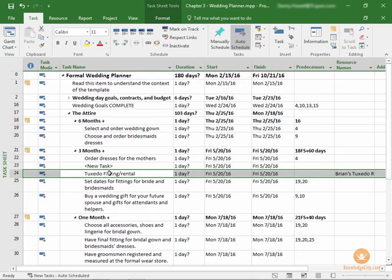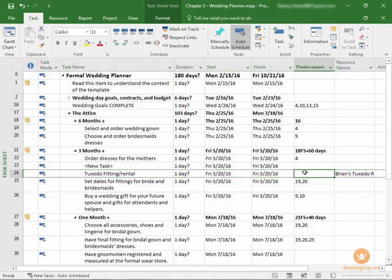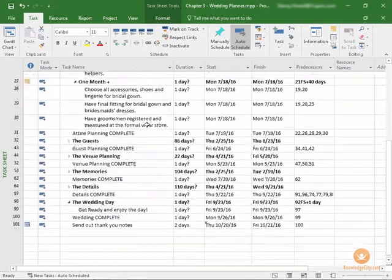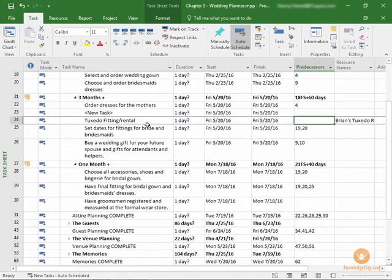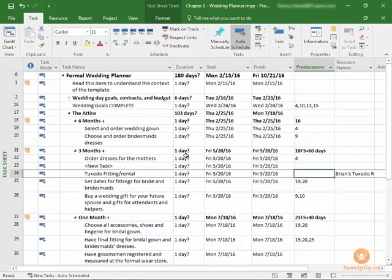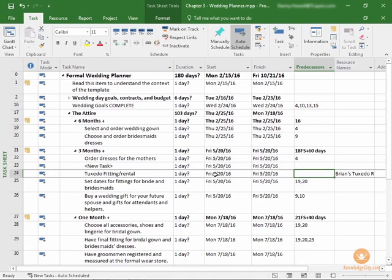And again, predecessors are a great tool for when you're having projects schedule your tasks for you automatically. I highly recommend it. Manually scheduling tasks can become burdensome if you have a large number of tasks, such as this list here. By allowing project to automatically schedule those tasks, you are simply selecting when they start and about how long they will take, and then project will determine the best time and dates in order to meet your project start date with all your task durations, or if you have a finish date in order to meet that finish date. And that completes this lesson on adding tasks to a project.